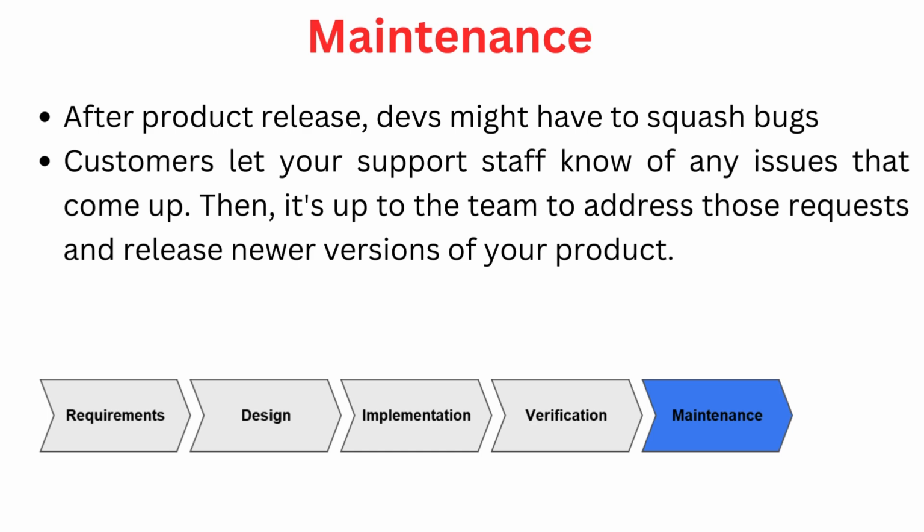So during the first few weeks or months after the production deployment, the original development team is typically allocated to provide maintenance and bug fixes. We call it the post go live support or PGL support. This period may vary between a couple of weeks to several months depending on the complexity and also the size of the system. Later on, the full responsibility of the maintenance can be transitioned to a full time maintenance and support team.